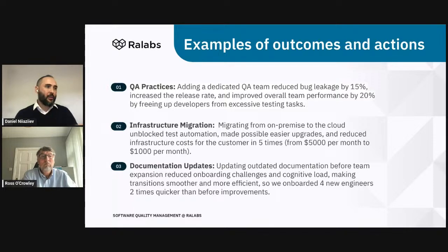Because they need to conduct additional calls. They need to distract each other from tasks and features development to share this knowledge. Because if you do not have this artifact, README files, Confluence documentation related to the project, UML diagrams, and so on, it's much harder to onboard people.